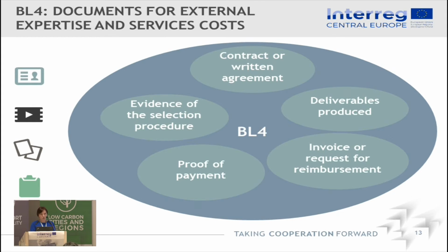You need to remember to conclude the contract or have some written agreement specifying what the service is, to which project it is related, by giving the project name, acronym, and so on, and specifying the service. In case you make any amendments to the contract, please also remember to document this properly, and also refer back to the selection procedure, to check whether an amendment is allowed, taking into account, for example, public procurement rules or not.